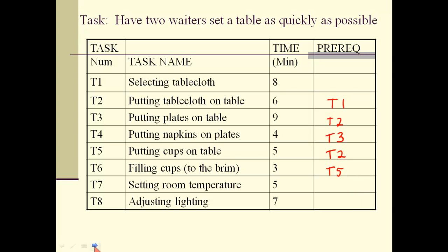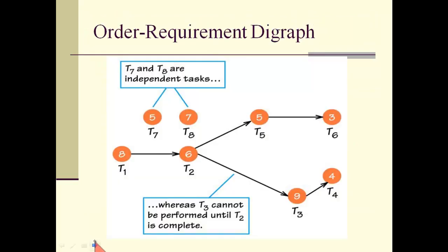We're talking about graphs here, so let's take this information and translate it into a graph. Same information, perhaps just easier to read. And it looks like this. So remember we had 8 tasks, T1 through T8. They're listed here. And now our prerequisites are being given in terms of a directed graph. T1, remember, was a prerequisite for T2, and T2 was a prerequisite for both T3 and T5. And for example, T7 and T8 had no prerequisites. So that's why the graph looks as it does.